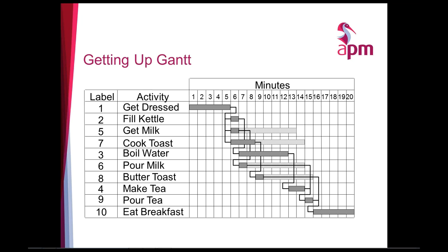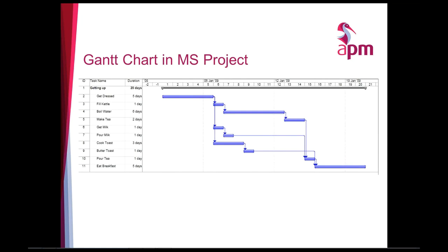Now, if we were to draw that in Microsoft Project, this is what it'd look like. You can see now I also put the summary bar at the top. Summary bars are quite useful in Microsoft Project because you've got a little plus and a minus, and you can actually compress and expand the summary bar. So if you've got quite a long, complicated schedule or program as they're often called, you can roll them up into the summary bars and just expand the bit you want to visualize.